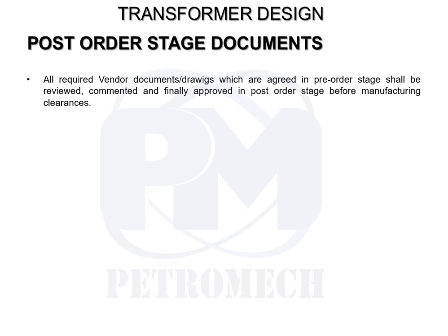For each equipment, we prepare a document which has to be furnished as part of the inquiry stage, which we have to check in the inquiry stage itself for doing the technical bid evaluations. That may not be an exhaustive one, but maybe a precise document, right? The list which we can populate later with you all.